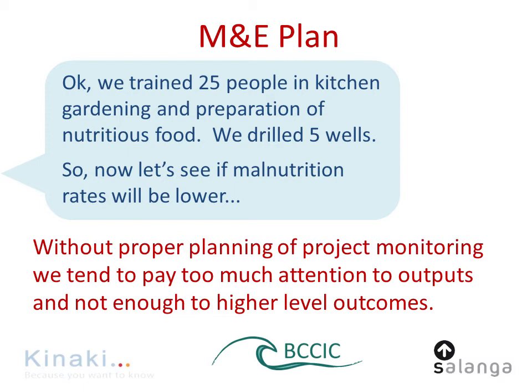The monitoring and evaluation plan may include, and I mentioned it already in the previous slides, basically we want to look at the indicators, also the outcome statements. We want to look at the methodology. For example, are we going to collect it through household survey? Are we going to collect it through activity records, through focus group discussions, interviews, pictures, or any other ways?